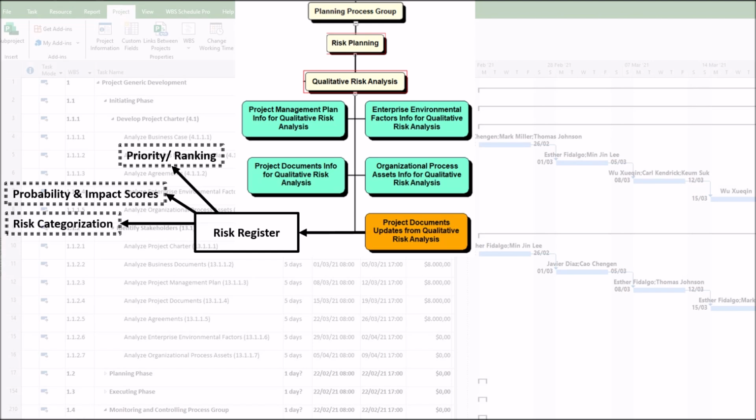Third, the third component is risk categorization. It tags risks by source, such as technical, external, organizational. It is based on pattern recognition. Reveals weak areas. If 70% of high risks are in the vendor management category, that's an immediate signal to investigate that process.